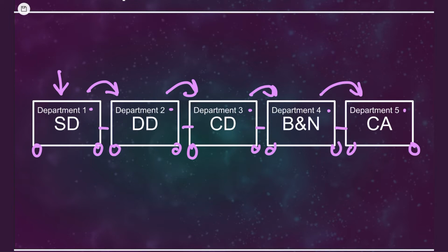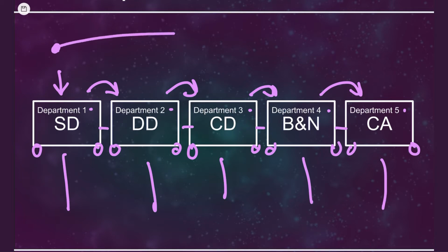The advantage of this type of team is you have highly specialized departments with standardized processes with experts in each of these disciplines, right? The disadvantage, however, is that the initial design or team goals get lost in the process by the time they get to that phase. The project essentially changes hands after every major phase or milestone. During construction administration, the team will not have the knowledge that the initial design team had to ensure that design intent is captured when RFIs come up, for example.